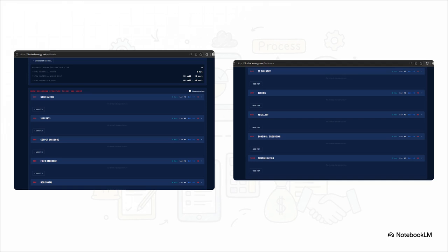You can see the full scale of it, running all the way from Section 000 for mobilization right down to Section 1000 for demobilization. Every single task you estimate gets assigned to one of these specific categories. Actually, it demands a specific home. This completely eliminates the guesswork of where labor hours belong and gives us an incredibly clear picture of where the project's costs are concentrated.